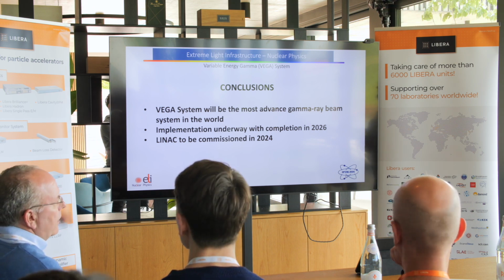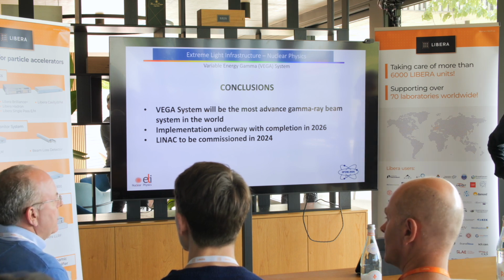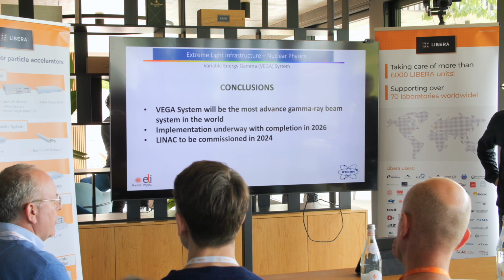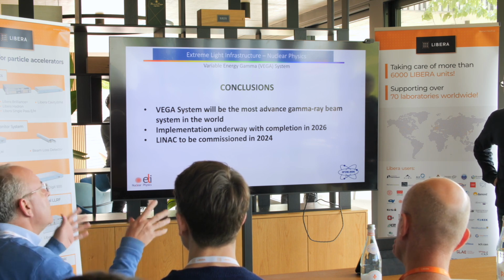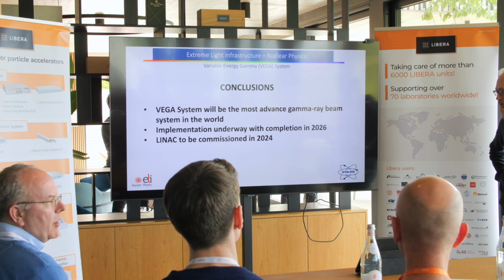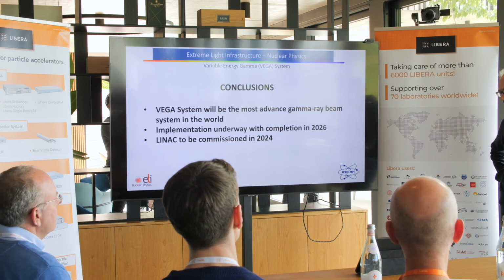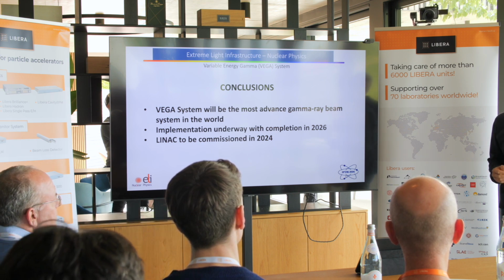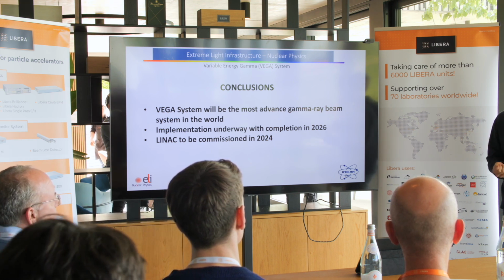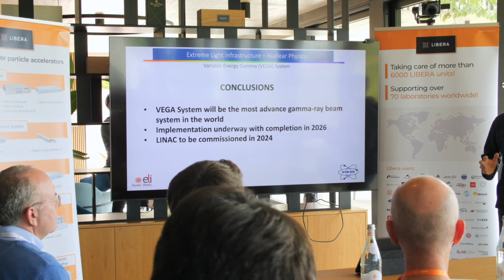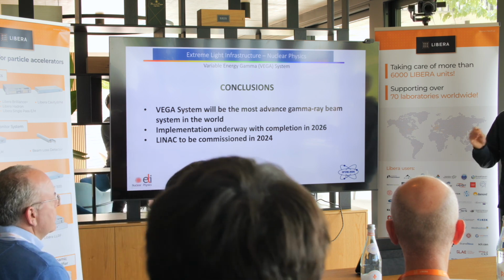If there will be some delays, do you see them because of the suppliers being a bit slow, or maybe the team is too small? No, I would say no. I would say that it is because we needed to sign some assistance contracts with some companies, and the bureaucracy is pretty big, and we still have not succeeded to sign those contracts.